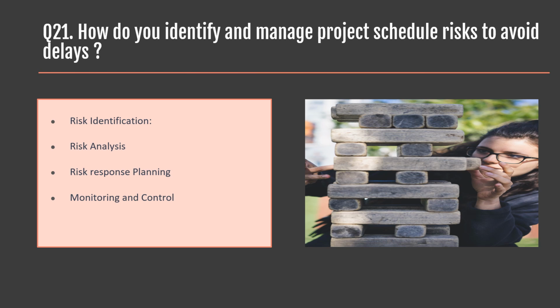Here she identified the possible delays in backend development due to a complex payment integration and scope creep challenges due to frequent changes in requirements. She also sought inputs from experts and consultants in app development and project management to get fresh perspectives on potential risks. Secondly, she did risk analysis by performing both qualitative analysis and quantitative analysis.